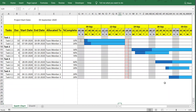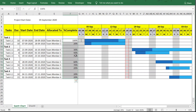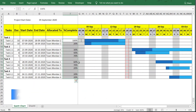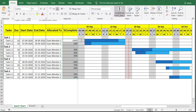Let's begin enhancing our Gantt chart. This is the Gantt chart we prepared in parts one and two. The first thing we are going to do is format the percentage complete field — this column here. We will use conditional formatting to give a look of progress bars in these cells.